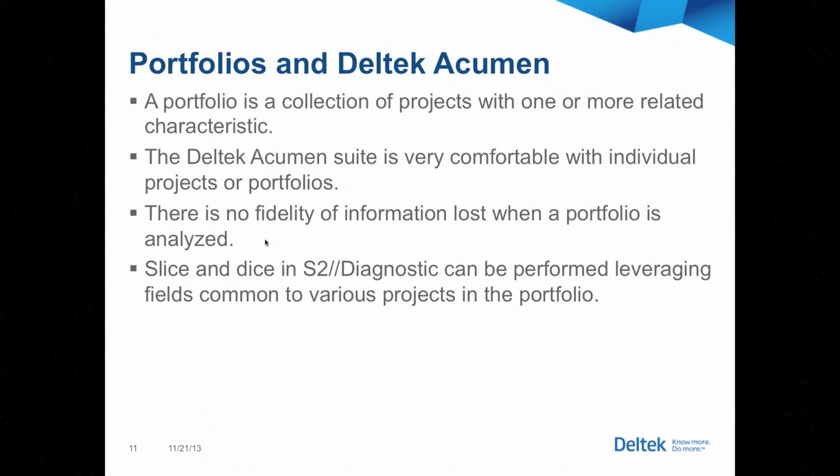One field that I'll be using throughout my examples today is called location. It represents the location in which the work in my project is taking place. If I code location on every activity, on every project in my portfolio, now I can do portfolio analysis by location, which transcends the individual projects.